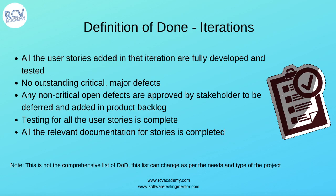Any relevant documentation for the user stories must be completed, as these are the deliverables for the user story. For example, if you have picked a user story or an epic for which a design document is required, you need that documentation. Test cases, if required, need to be documented and added into the execution cycle, with execution done in the tool. After test execution, you should be able to produce a test report for the execution.